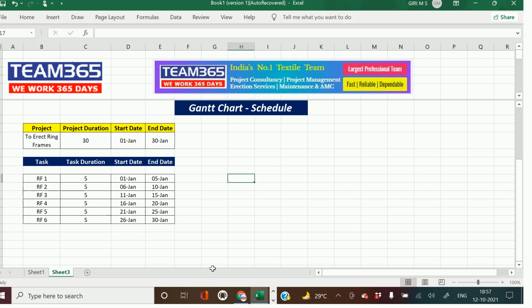Let us check whether the table is functioning properly. Say instead of 5 days, the first machine is taking 6 days. So from 30 to 31 days, 31st January. The second machine is taking 8 days because of some floor issues, some rework issues. So then it becomes 34 days and project has gone to 3rd February. But the last ring frame has taken only 4 days, 2nd February.